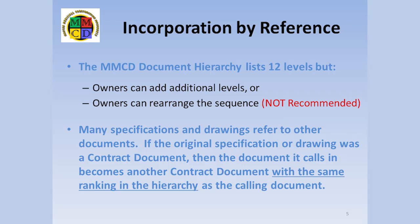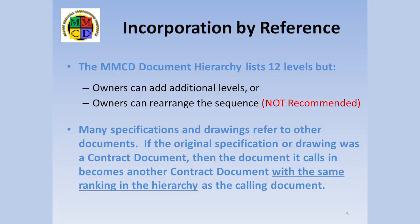Earlier, I mentioned that some documents refer to others which make those others contract documents too. I'm occasionally asked at what level these reference documents appear in the hierarchy. The short answer is that they come in at the same level as the document which called them in. For example, if a supplementary specification refers to a CSA standard, that CSA standard comes in at the level of a supplementary specification. The only time this gets a bit confusing is when a contract document calls in a document of another type. Just keep the same principle in mind — the other type does not matter. The new document comes in at the rank of the calling document.